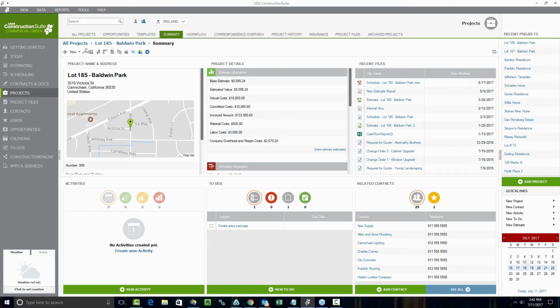Just like before with the contacts, you do have some additional tabs up at the top. For your projects, you have all projects, the limited list of opportunities. You'll also have an even smaller list of project templates. The idea here with the project template is you can go in and define the typical information that you would need for a project of this type. There may be a workflow associated with it. You might have some project dimensions that you want to set up. You may even want to set up something as simple as folder structures for the job and have some of the standard files in there that you need for every project, like safety manuals. All of that can be set up as part of a project template, and the templates portion is going to be here in this tab.